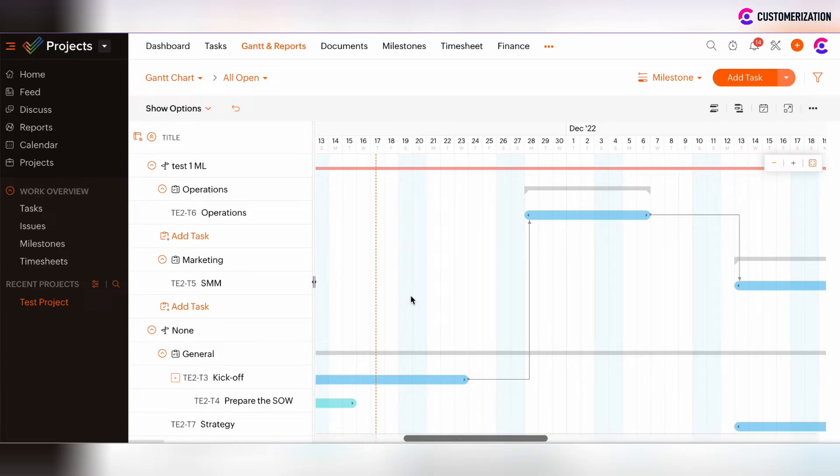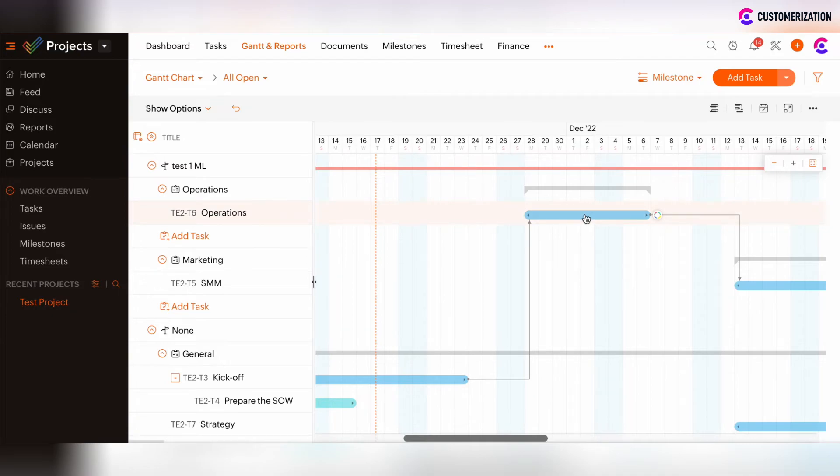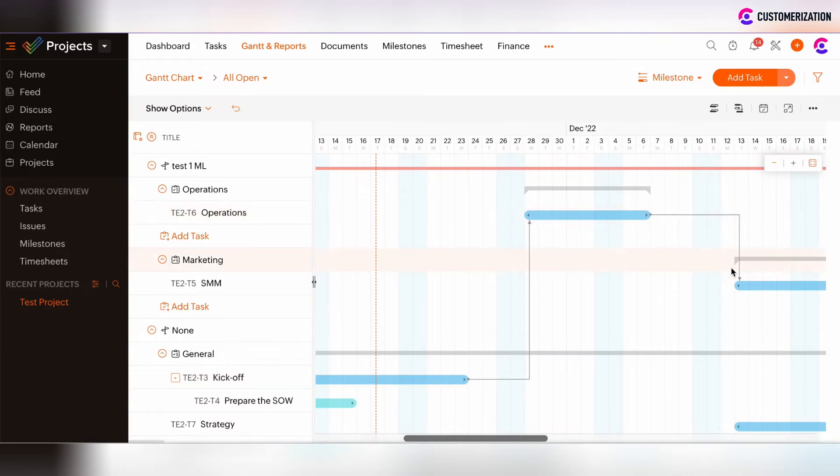So the logic is that only when we complete the kickoff task, the operations task can be started and then closed. If kickoff task is not closed, then operations task and SMM task couldn't be closed also.